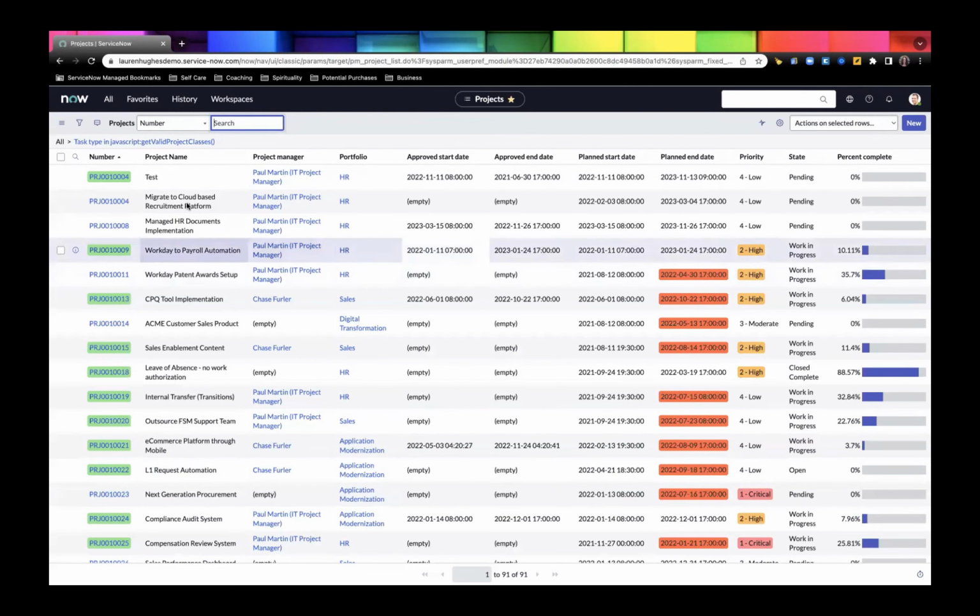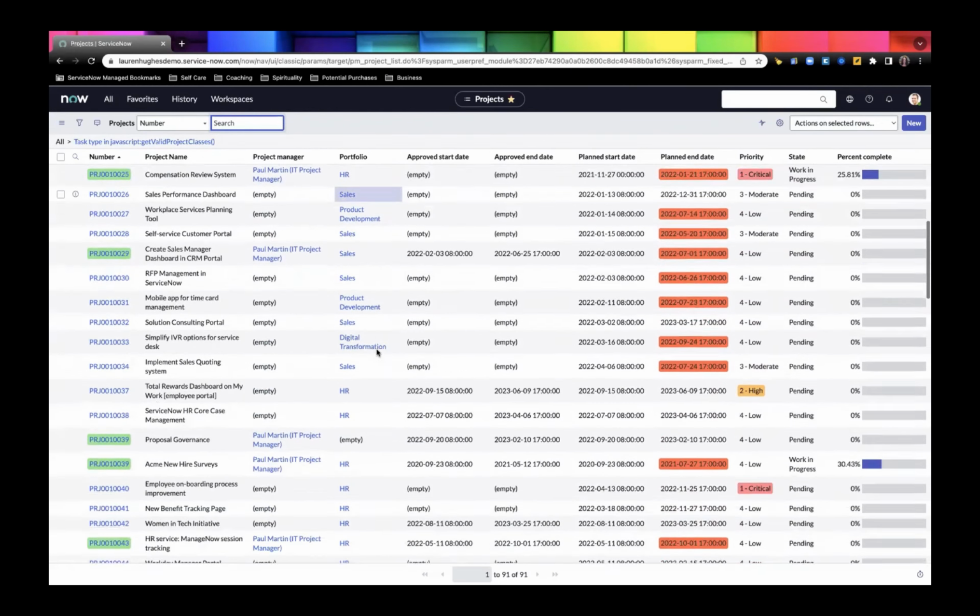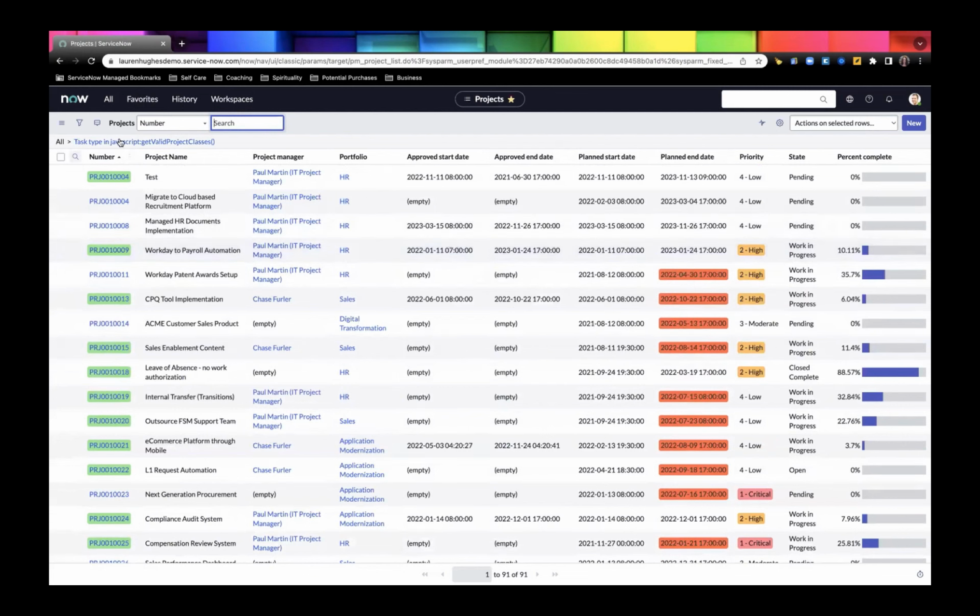If I wanted to go and look at the specific projects, I can see their priority and everything, but I don't have a specific resource filter here. You can go in and create a filter though, and say, okay, I want to see projects that have this resource as a resource on them. So you would just take this basic list and filter it to projects that have that resource in them. Does that make sense? Yeah, no, I get it.